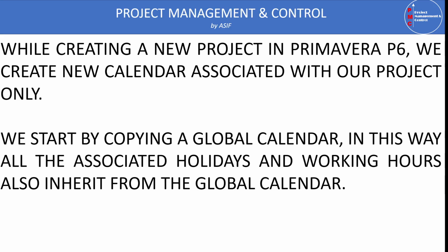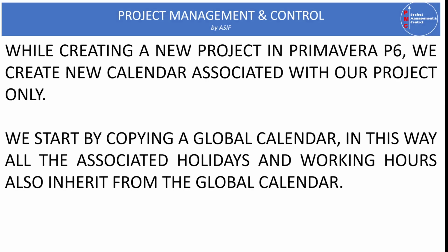So once you copy from global to project calendar, you don't need to define the holidays and working and non-working hours in the calendar, because they are already specified in the global calendar. So it will save a considerable amount of time, and at the same time, you can add specific project requirements in that calendar. When we copy our project calendar from the global calendar, all the holidays and working and non-working hours will be inherited from the global calendar to the project calendar.